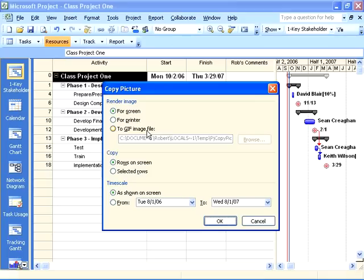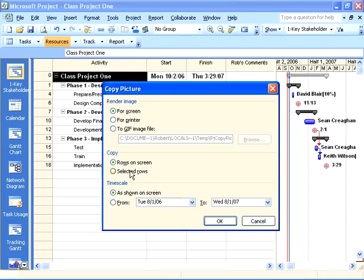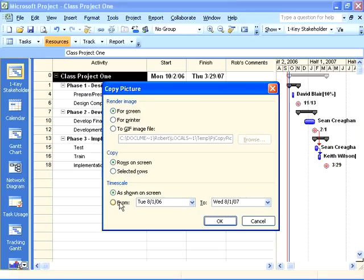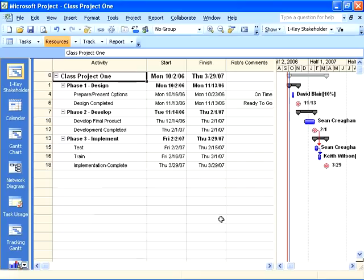For me, a very simple thing to do is save it to the screen and then paste it, kind of like copy-pasting of whatever view you have running into the application. We're going to copy the rows on the screen. I could have selected a specific set of rows if I wanted to. You can also control the time scale. If I like the way it's shown on the screen I can just keep that, or I can adjust that by going from whatever date range you want. I'm going to select as shown on the screen and hit OK, and that's all you got to do.